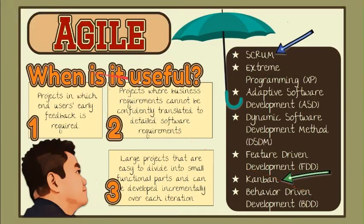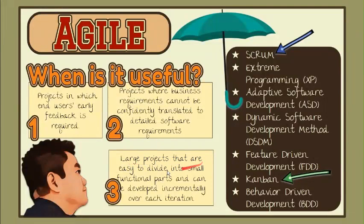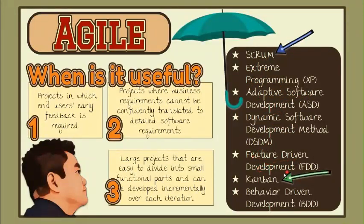When is Agile useful? Any startup initiatives where end users' early feedback is required. Most mid-sized projects in custom software development where business requirements cannot be confidently translated to detailed software requirements. Large projects that are easy to divide into small functional parts and can be developed incrementally over each iteration. Agile is an umbrella term for several methods and practices, including Scrum, Extreme Programming, Adaptive Software Development, Dynamic Software Development Method, Feature-Driven Development, Kanban, and Behavior-Driven Development. In this video, we will talk about Scrum and Kanban.